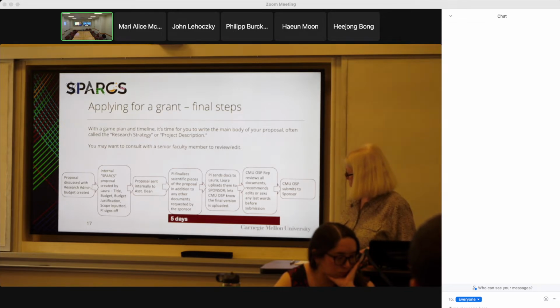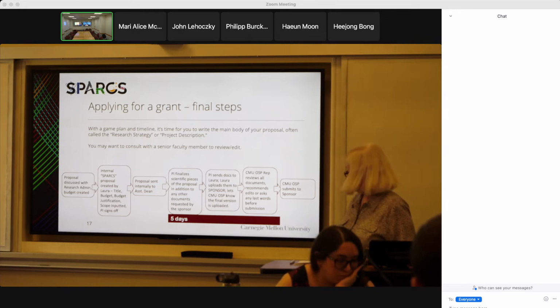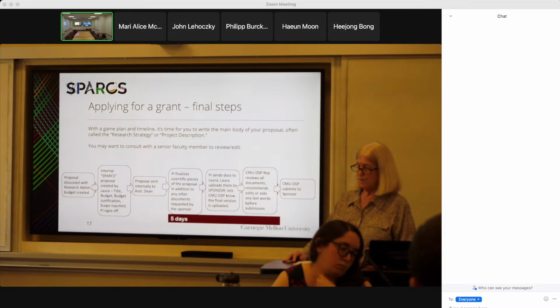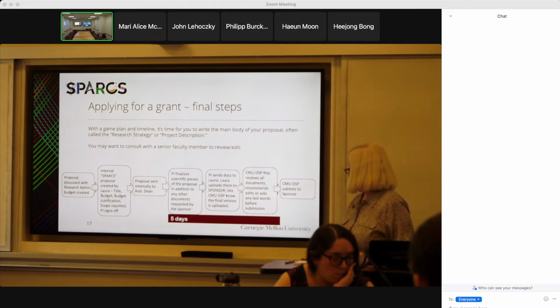Then I send that off, it goes through the dean's office, and during that time you can go ahead and keep writing your science. Once we get towards the end, within this 5-day period, I really need something that's closer to your final document. And that's 5 working days, business days. At that point, those folks will review it over in the main university. There are institutional sign-offs, and they will push the button over there to get it submitted to the sponsor. In the meantime, one other step I do is enter everything into the sponsor system, so they just review what I put in there at that time.